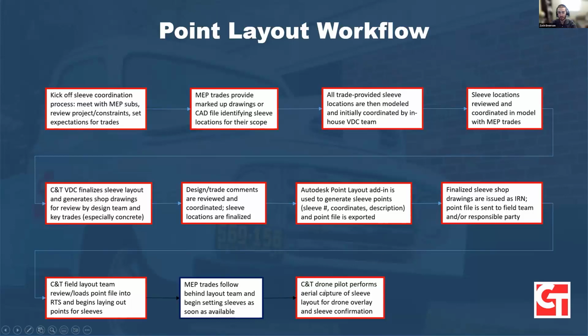And then we also will, I'll touch on this in a minute, but we follow up with a drone photo, just a straight down view of the slab that we then overlay with our layout to make sure that everything lines up as best as possible.